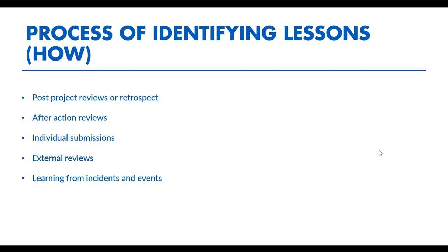So this is much shorter than a project review, and in the format of, for example, review meetings, which we do quite regularly. And it's to draw up lessons on activities that we are implementing rather than a whole project or a whole program. The purpose of this is to help teams gain immediate feedback on their performance, and to immediately apply the lessons or the recommendations emerging from the lesson identification exercise for the purpose of course correction.